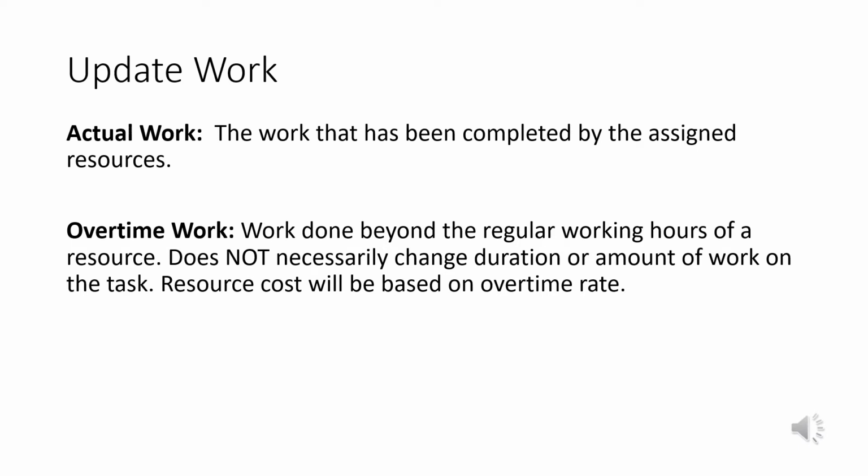Actual work. This is the work that's been done by the assigned resources. How much do they actually do? So you might plan on 6 hours, but they actually do 8 hours. That's the actual work, 8 hours.